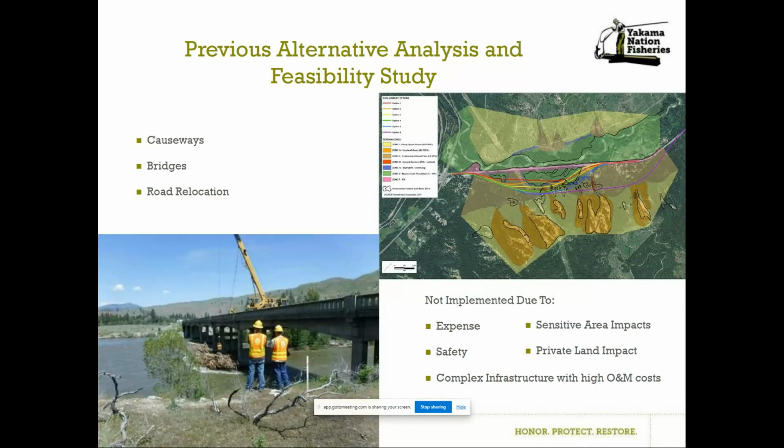Thanks. So, John, phase 1 obviously gets the road removed from the floodplain. And what's been causing the problems for getting the entire road out of the floodplain is the cost. In this picture, and I can probably go to a better picture, that yellow area in the coloring is the major contributor for the costs. Avalanche issues are what you have to mitigate for.